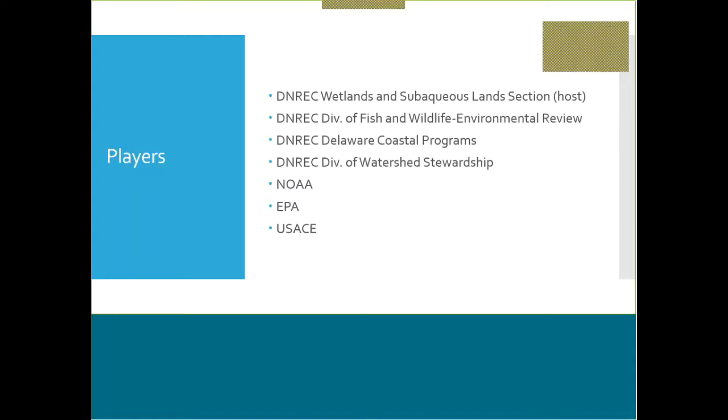Okay. So I was just saying that it's typical when we have these JPP meetings that everyone will introduce themselves, and then from there the applicant would go ahead and present the project. We do want a pretty good presentation given to us so that we know the scope of the project. We're looking for different elements, such as if you have an idea of what your proposal is, even if it's not an engineer-grade plan, if it's at least a conceptual plan, if you can put that on a plan view and cross-section view, that's something nice to supply to this meeting, and it would be part of your packet that you're supplying before you attend the meeting.